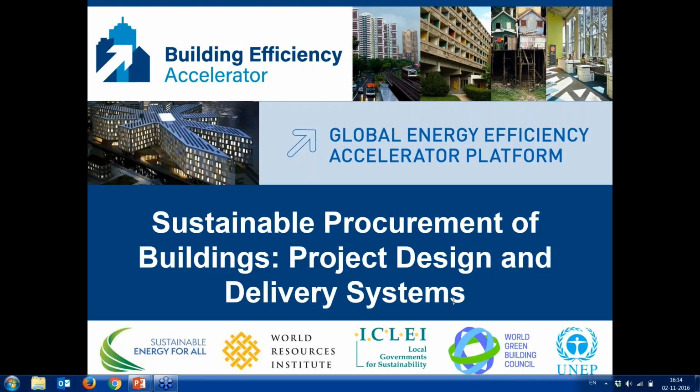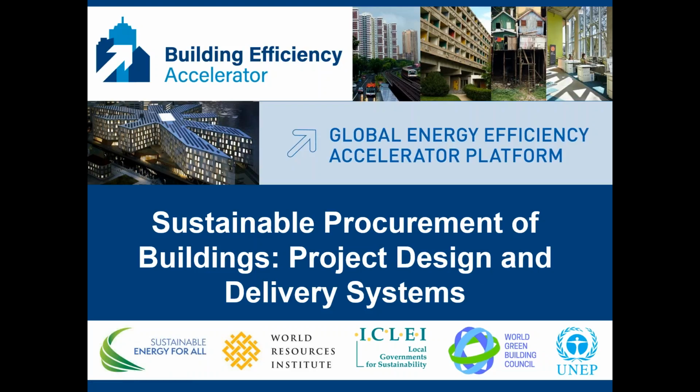Oh, okay. Yeah. So, from our perspective, there certainly are studies on that. There's also been studies about the cost of net zero energy buildings, not just high-performing efficiency buildings, and I think the real truthful answer is you could look at data out there and use it to make a good case, but that it tends to be very project specific. But I will say that another opportunity for the RFP process is to ask project teams, including whoever's responsible for budgeting, usually the contractor, to participate in an iterative first cost optimization so that things like your improved building envelope and lighting should translate into reduced cost of your HVAC and mechanical equipment.